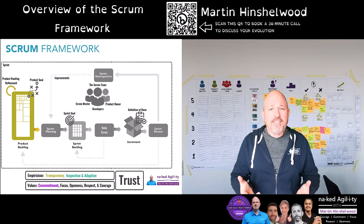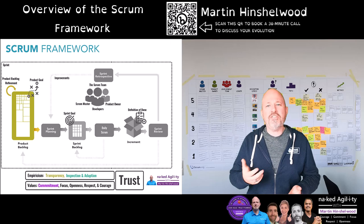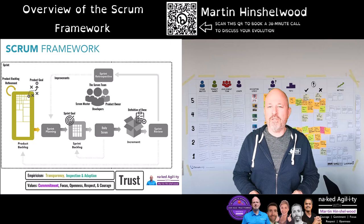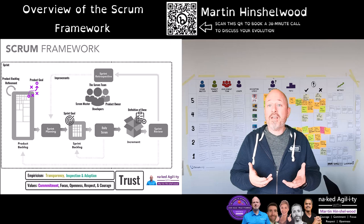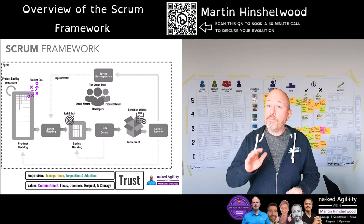The product backlog should not contain more items than the product owner can easily understand and articulate, but enough to foster understanding and success for the product. Too many items create too many assumptions. The commitment to the product backlog is the product goal, which reflects the desired outcome for the next few sprints and informs — but does not control — the contents of the product backlog.